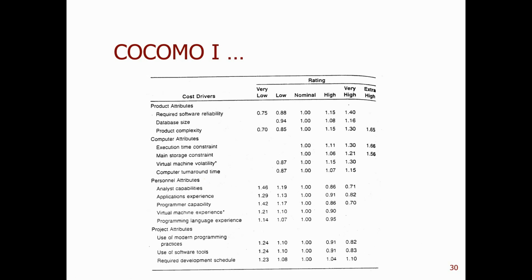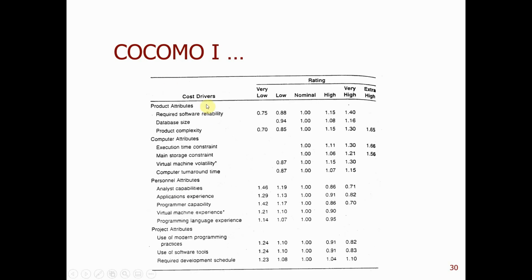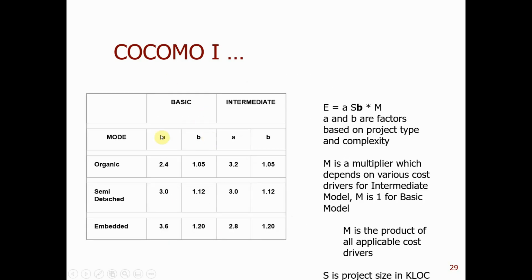Cost driver. This only applies to the intermediate model. In the basic model, consider that it is used in the earlier phase. You don't have much detailed insight into your product, so you don't have this cost driver information. You only know the size, but you can still do some estimation.